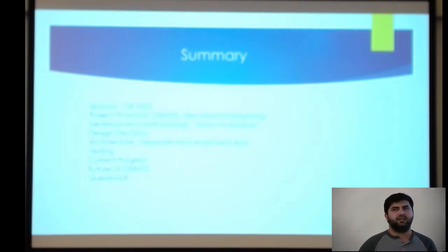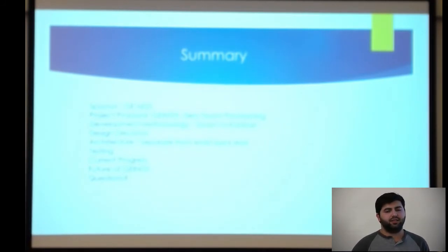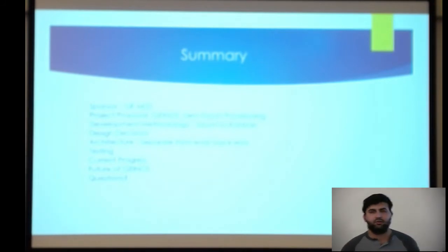Also for risk management, we didn't have a formal way of addressing risks, but we met at least once a week and discussed different risks that could potentially be blockers, and we recorded those risks. When we met the sponsor each week, we talked about those risks and did what we could to mitigate them. That's all. Questions?